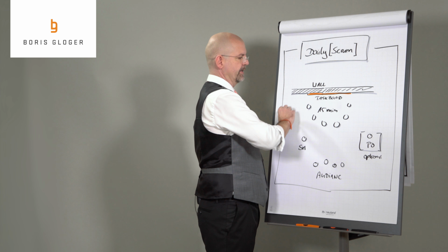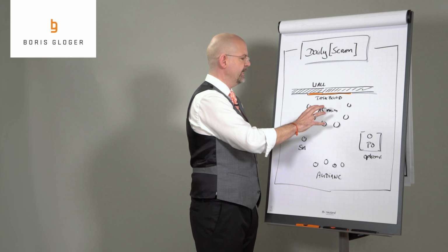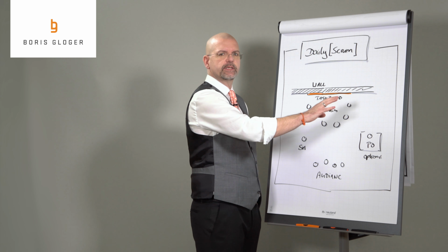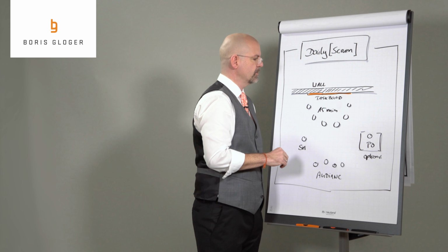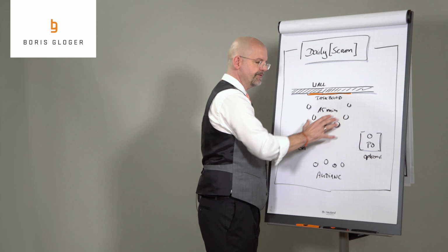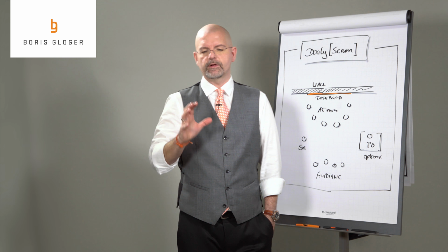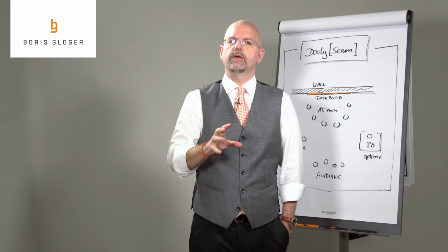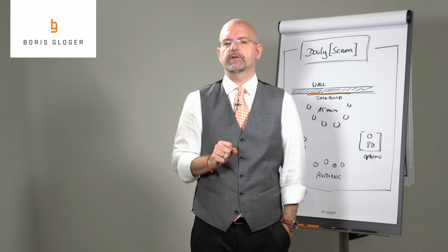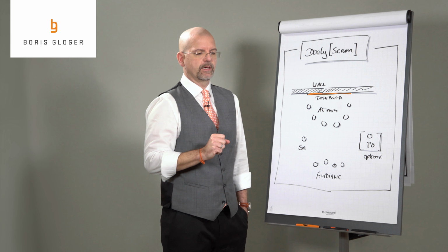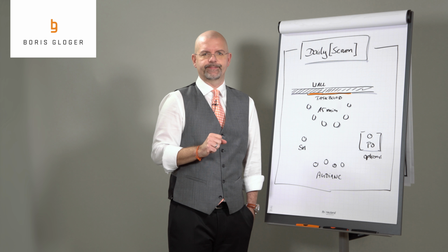Sometimes it's done in the hallway, and then people go through the development team because they really need to pass them because they have their work to be done. That should be a 15-minute meeting that is very, very focused, where the people talk for up to 15 minutes together and are not interfered with by anyone.